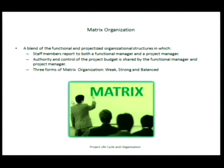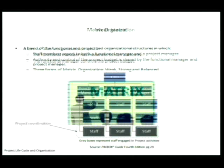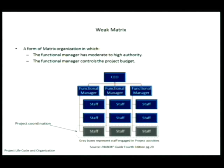Moving on to the matrix organization — a blend of functional and projectized. In the weak matrix, the project manager's role is still that of a project coordinator with very weak authority. The functional manager has moderate to high authority and controls the project budget. So there might be project management, but it's still very weak.